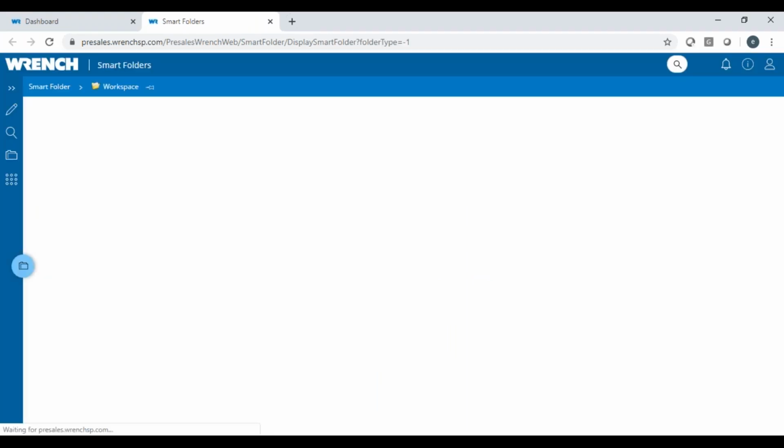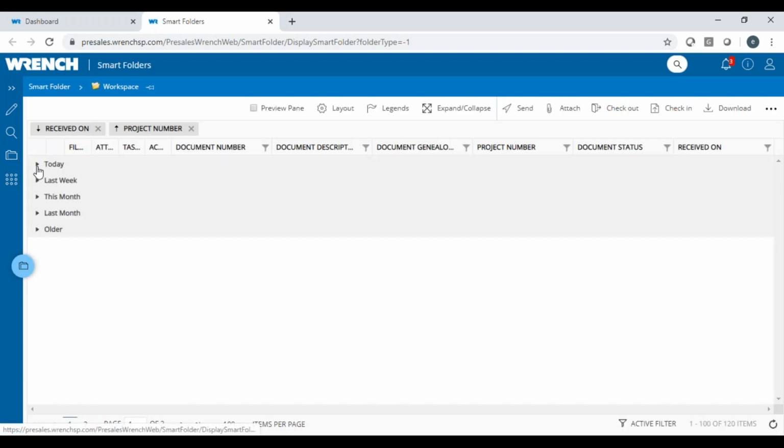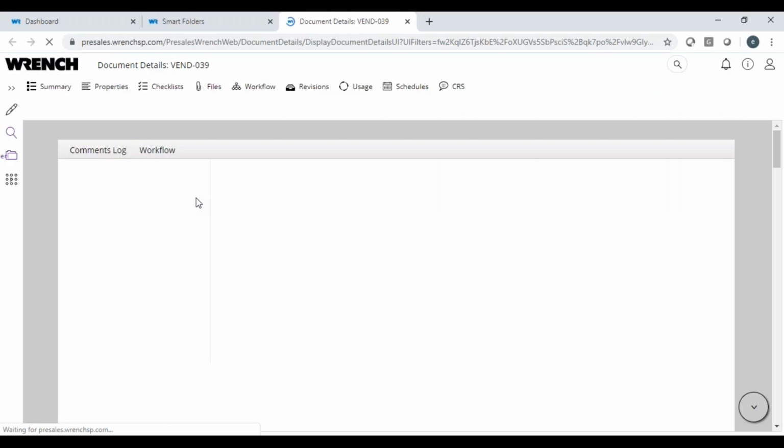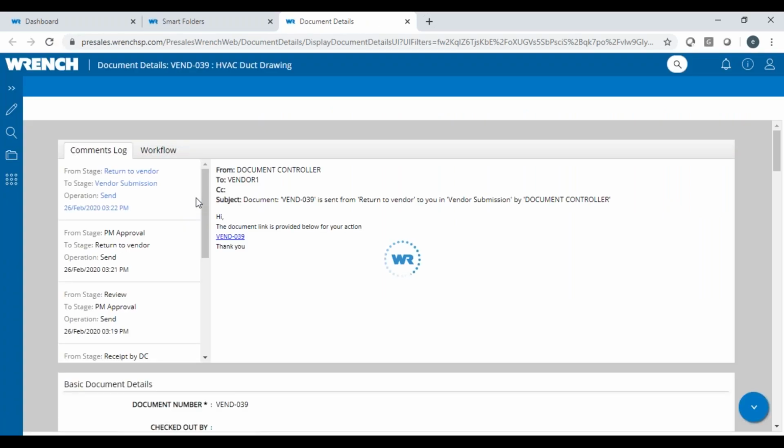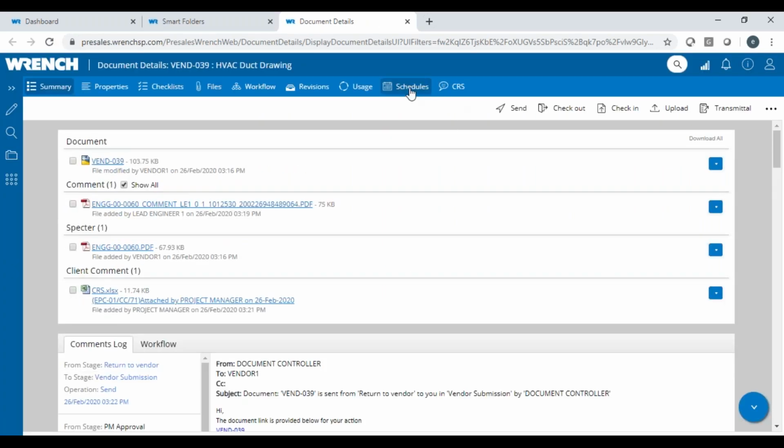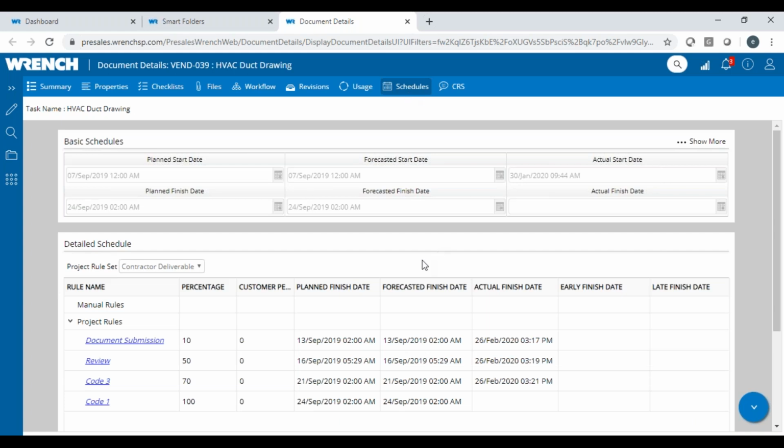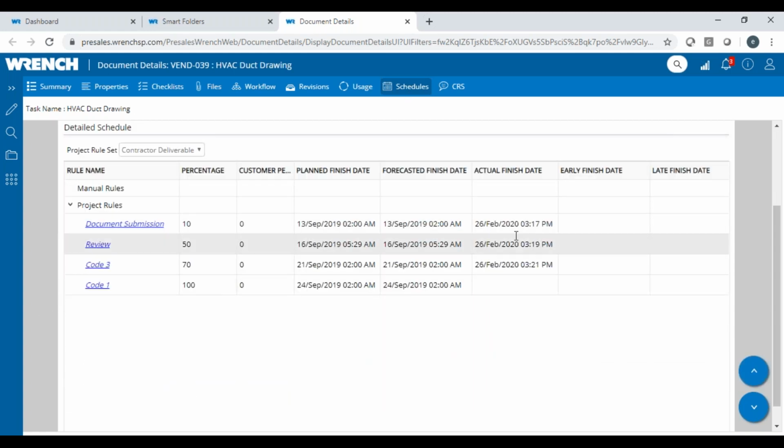So as the work happens, the system is not only capturing the data, it is also automatically updating the status, which means the benefit is you're not only capturing the common data of the design information, we are also capturing the schedule with the actual dates without the person having to enter this. You can see the actual date and time is recorded, and based on this I can see that this particular drawing has reached 70% progress.